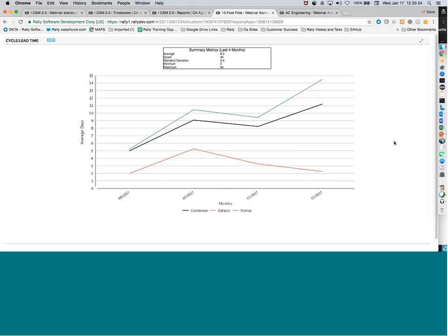Now, the thing about defects is, not all of them are potentially going to get resolved in this sprint, right? Depending on the situation, if it's a non-blocker, then you may defer that until later. So, again, that's why a single chart or a single measure is not the best way to understand what's going on. In conjunction with other things, knowing we have these defects, they're too big, there's too much work, we can't fit it into this sprint, so it's going to get carried over. Those kinds of things are important to understand as well with the just trending information.